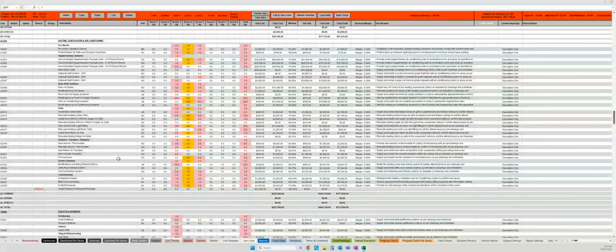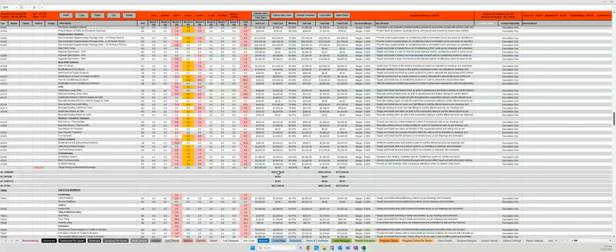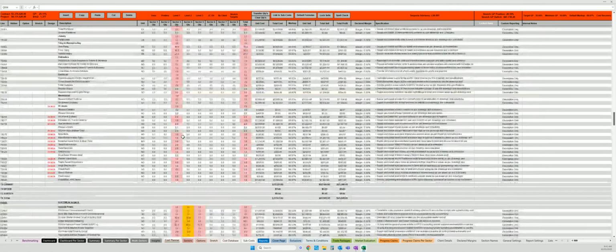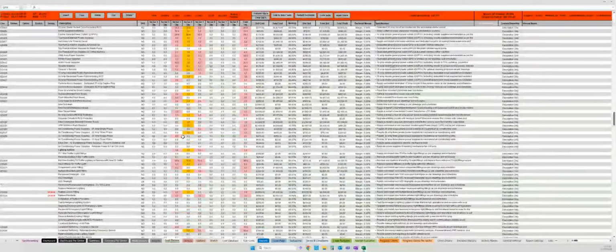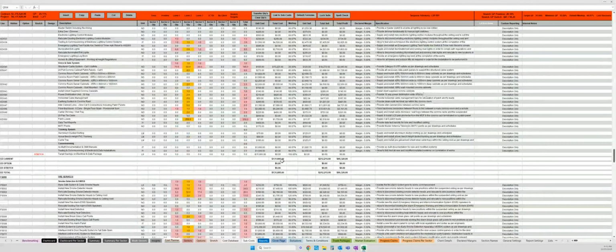I'm in the heating, ventilation, and air conditioning. It's a $230,000 cost above the line package, selling for $405,000. What if I can save $30,000 on this package? I bring my deficit down to $47,000. I look at electrical and data package, which is a larger package. It's $131,000 on the cost. What if I can save $15,000? I'm going to set myself a $15,000 cost side saving.